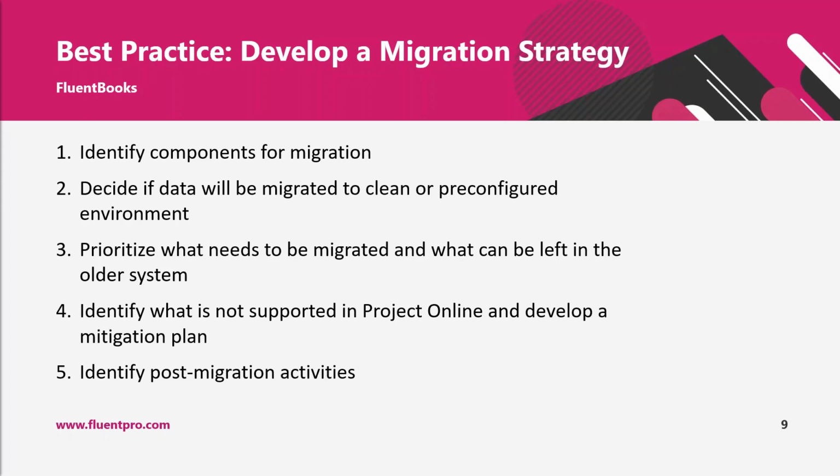It is possible that you would decide to bring your active projects first, and for completed projects you can either migrate them later or even migrate them to a separate PWA that would act as an archive environment.